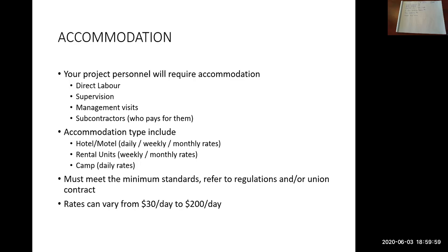Rental units, that's kind of the same thing. Or is there a camp? Now, camps are typically for fairly large projects, like the Site C Dam up in northern BC. Maybe there's a cost for camp, a daily rate for camp. Those things should be provided to you. If you're going into an already established camp, you would typically be told what the daily rate is for the camp.